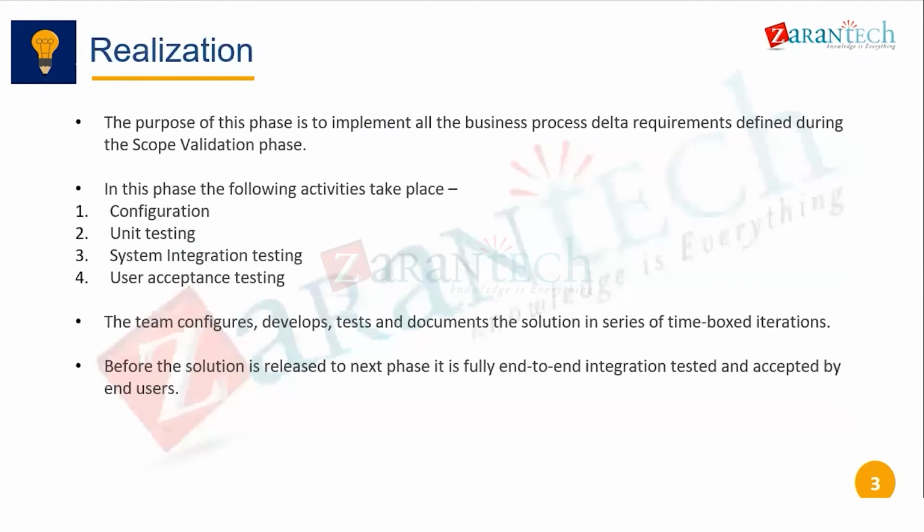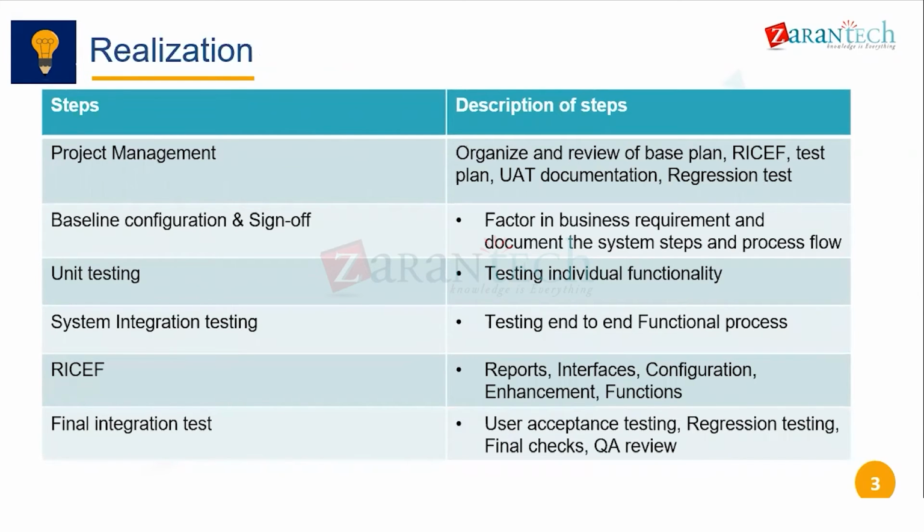Right, now we come to the phase of realization. You have documented everything that needs to be done for this particular project. In the realization phase, you are doing the configuration and the unit testing. Here you can see different types of testing terms. First, configuration, you are very clear on, right? The steps that we were doing in the class. So in the realization phase, based on the requirements that you have, you will first do the configuration. Let me go to the next slide, then it will be easier to explain.